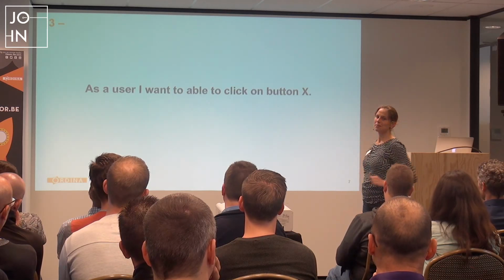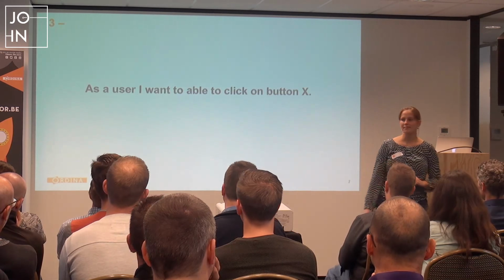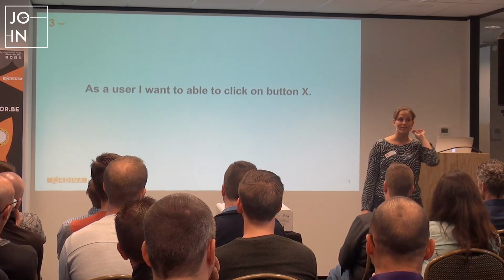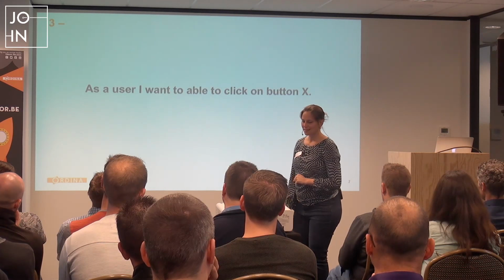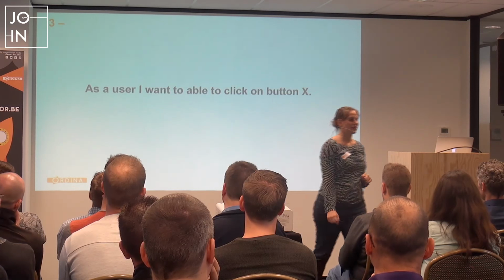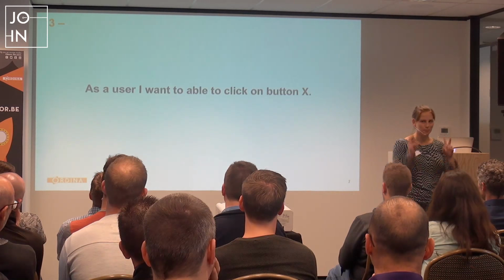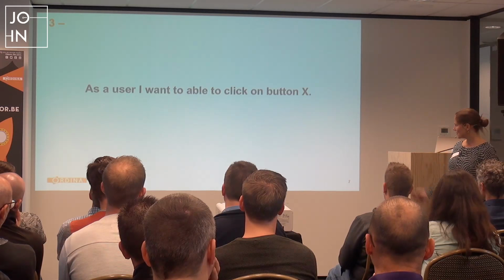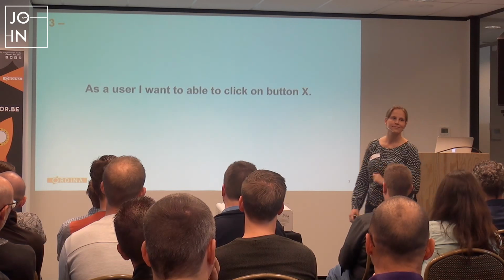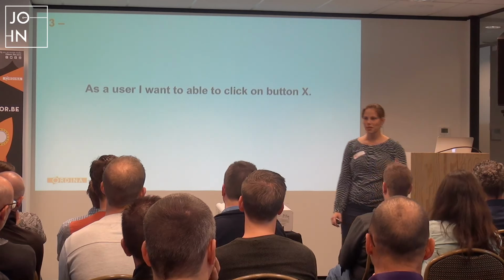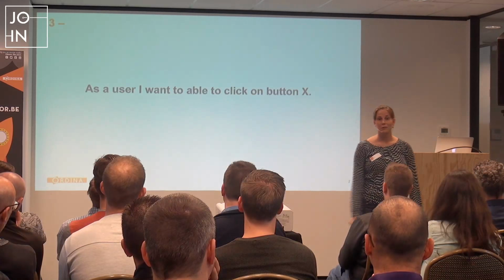And there's something fundamentally missing in this user story. The why, yeah. So I went and reordered a backlog, and instead of writing these two parts of a user story, I deleted them, and I wrote only the so that. Point by point, so that. And then that was fine. And we implemented user stories in that way.